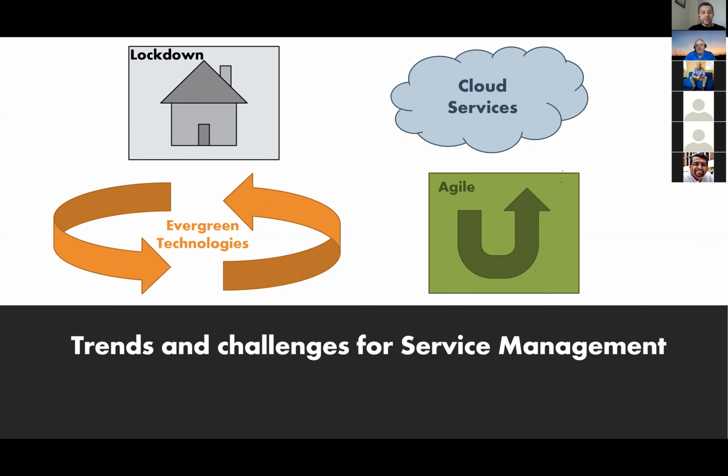And I think this is one of the things I didn't talk to specifically when we talked around processes, but no process is an island, and we need to think about what's upstream, what feeds into it, and what's downstream and relies on it in terms of how they work. I think this is a classic example where they need to be separate processes, but they need to think about how you're going to transition from one to the other, because nothing will go live from a project or software development unless it goes through change management and CABs.